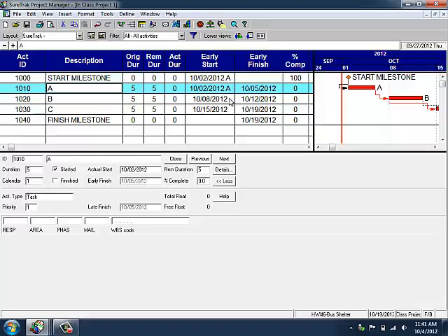So we're sitting here on Friday afternoon, October 5. We know that it's going to finish the end of next Monday, which is October 8th, right? But on Friday afternoon, how much work is left to be done? 1 day or 2 days? We'll work 4 days on a five-day activity. It's Friday afternoon. How many days are left to work?